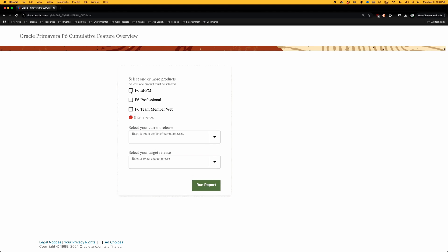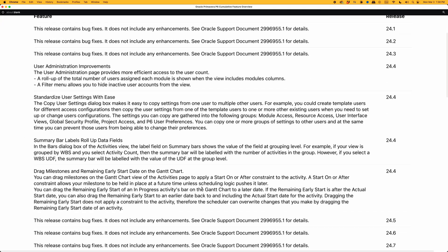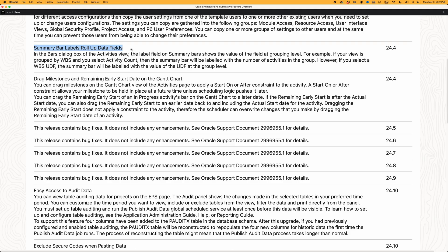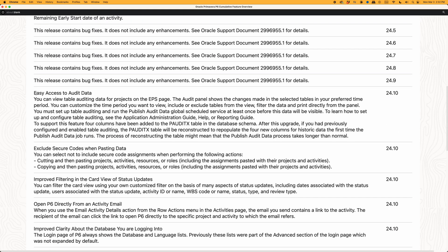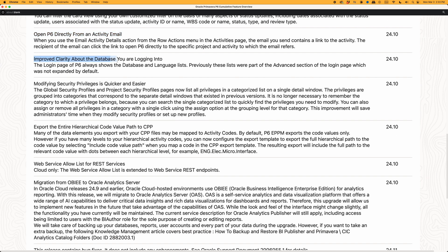If you happen to be an EPPM user, you can also run this report on EPPM. For those running EPPM and working in the P6 website, there are notable improvements: things around user administration, standardized user settings, summary bar label rollups, drag milestones and remaining early start dates on the Gantt chart, easy access to audit data, open P6 directly from an activity email, and improved clarity about the database you're logging into. I'll put a link in the description so you can check it out.